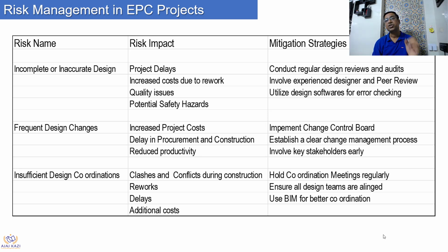Establish a clear change control process, a change management process, in the beginning itself. If this is a change, how does it trigger, who evaluates it, who gives an impact, who approves it. Without it, it will not move.